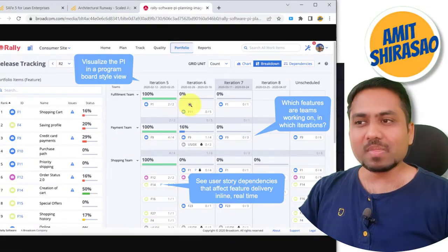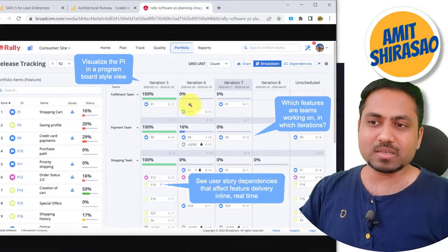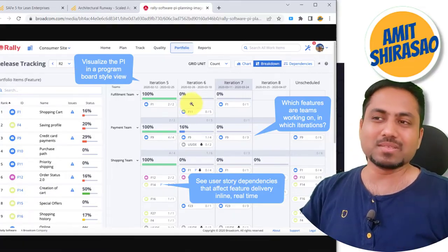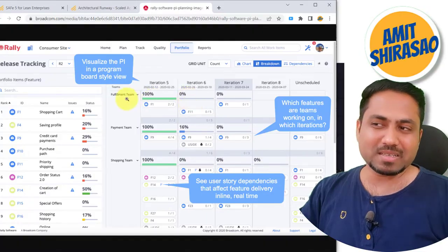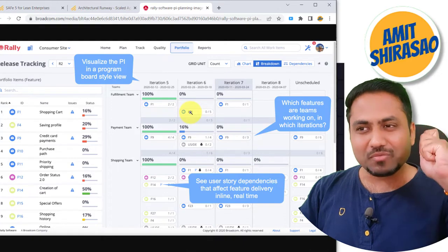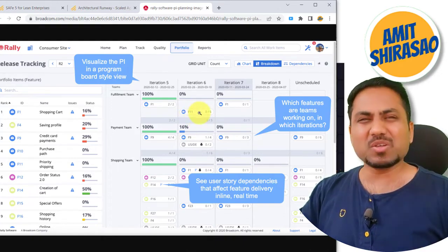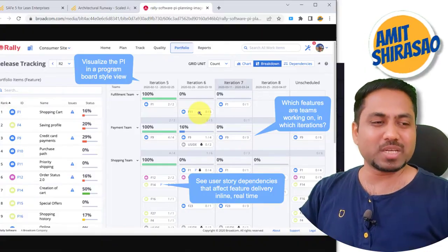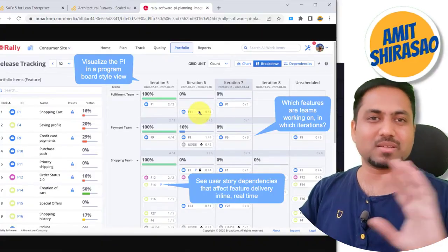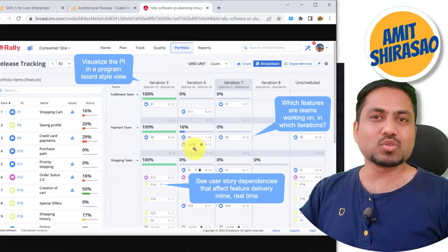So what they'll do now, there's a very tailor-made solution, but many a time it happens that the fulfillment team will say, okay, I require that story by the starting of the next iteration. So you take these two API people, you take them for 2 days, and please get it done, give it to us. Or alternatively, you give those two stories to us.